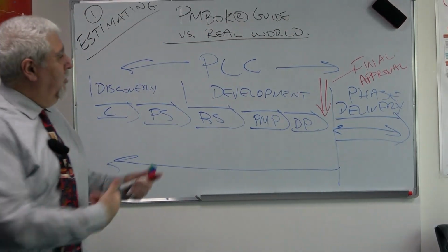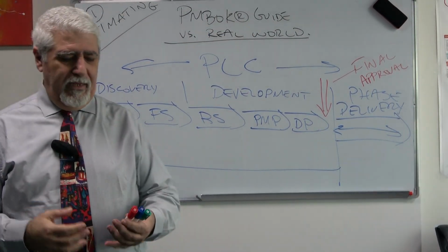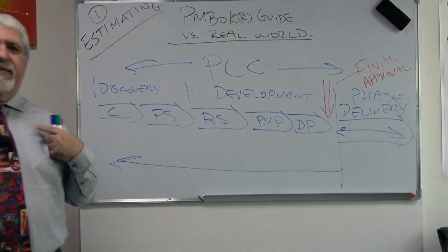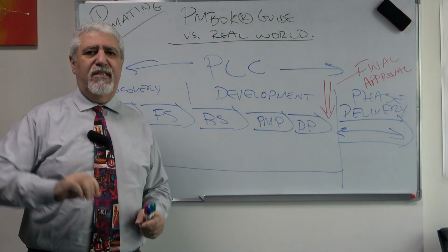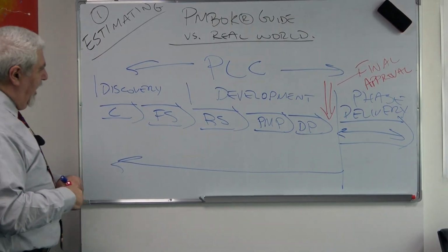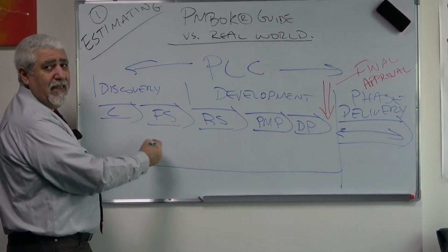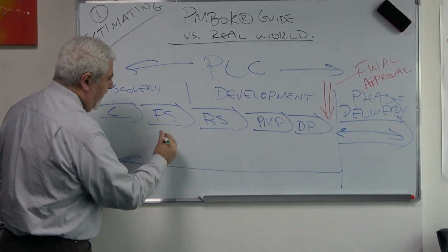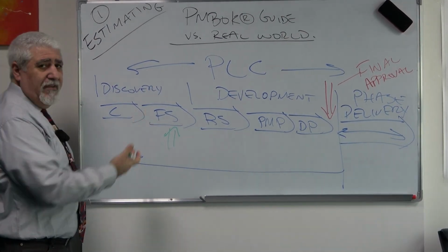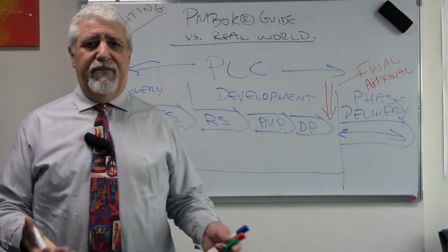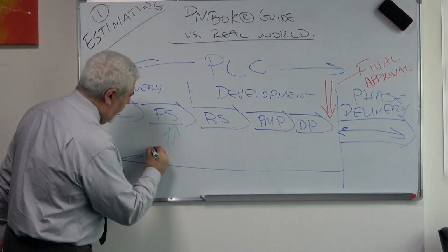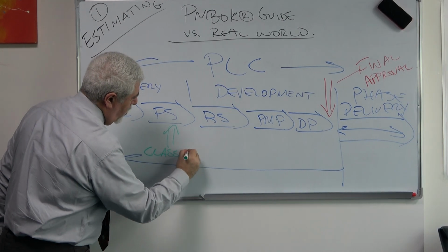Well, but how do we use the estimate classification here? Well, ideally, and I'm going to use the SUKAD way, camp classification system, not AACE or somebody else. And what we say is usually, when you are preparing your feasibility study, you have to do an estimate, because your feasibility study has to be a function of the cost and the schedule of the project. And in the camp model, we call this the class 1.